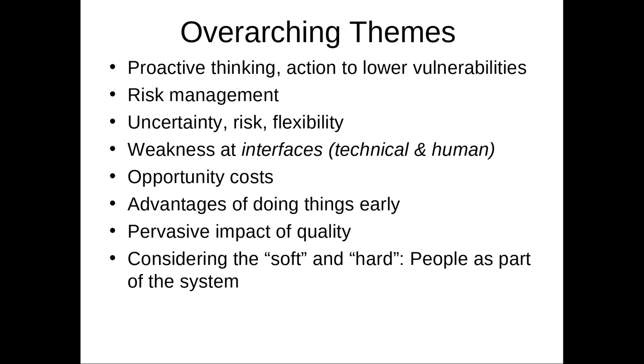If you have a defect within your system, within your code bases, even if you never fix it, one thing you can do of great significance is fix your process, the process that accidentally gave rise to it. Maybe it was a misunderstanding between team members, an inability to fully communicate a requirement. Maybe it was a lack of understanding of the technology by someone. Maybe it was fatigue on the project. Another thing that is so tied up with quality. Fatigue breeds low quality. And ladies and gentlemen, low quality, fatigue, they're tangled in a most unseemly and reciprocal fashion.